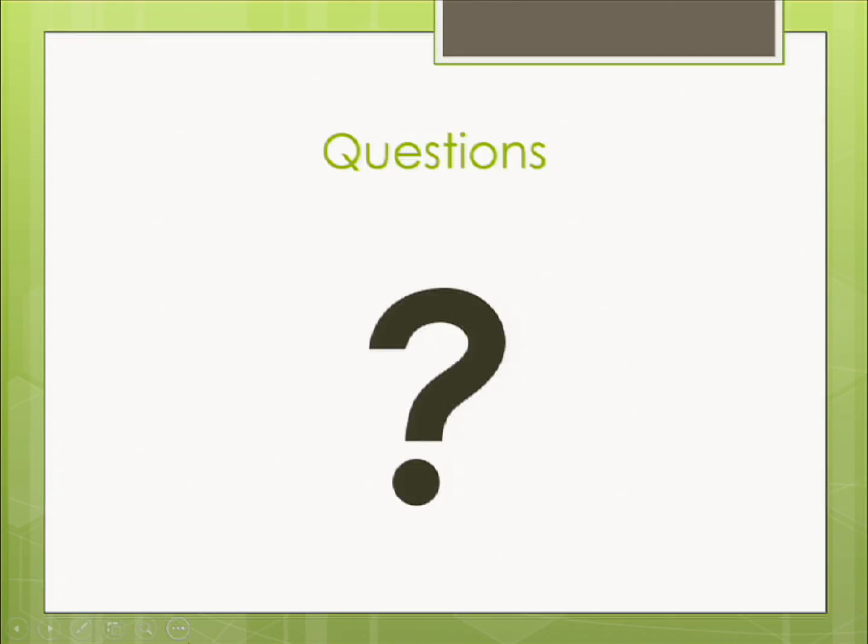Right, but I think it still can be helpful to post the Burndown in story points because they don't know how to translate it to hours. I've posted Burndowns with no numbers on the y-axis, so they can just see that, oh, we're ahead or behind, but they can't look at it and say, oh, they're 40 hours behind, and then make an interpretation off that. Well, that didn't work. I had to go put the hours on it, but I tried. So try different stuff. See what works.